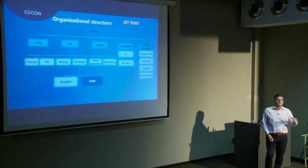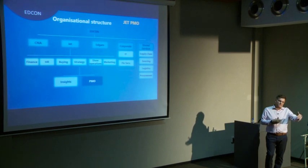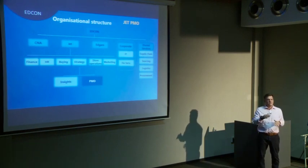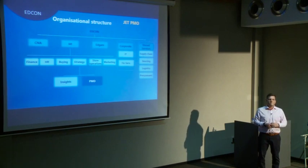What we've realized was that there was a gap between strategy and execution, because we had a lot of programs, a lot of projects, a lot of initiatives that we found useful and we wanted to do. And the time horizon for a lot of our projects, especially in retail, because you work with a financial year, your time horizon is almost 1 year because your money cycle works in a year. And a lot of those projects you couldn't fit in 1 year. Through implementation, a lot of them actually fell off because, how do you prioritize these kind of things if you only have a very short time to implement them?